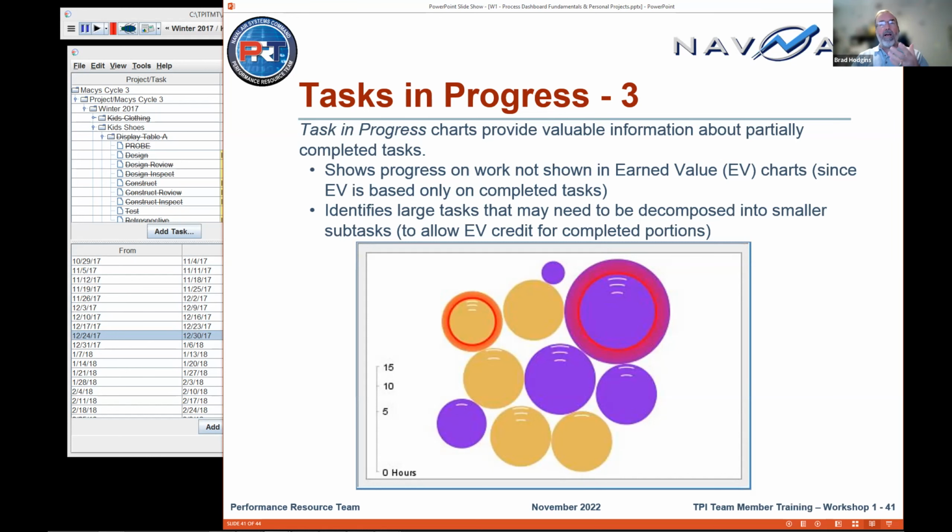Another benefit of this is if you see something that's huge, like right now I see this one here, it doesn't have any tick marks on it, and yet it's got 5 hours logged in it. I have a little red light that comes on, and a coach screen. Wow, that means this is at least 4 times bigger than what it is because it's not even a quarter yet. And so I might look at that and say, who's doing that and what is it?